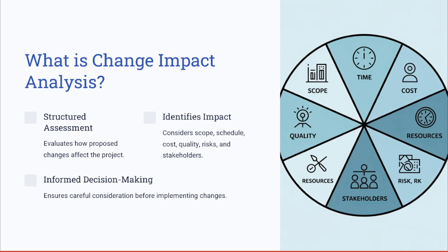For example, in a hospital IT system upgrade, adding a new patient portal feature may require additional testing, training for staff, and integration with existing databases. Without a proper impact analysis, it could lead to downtime, data loss, or compliance issues.